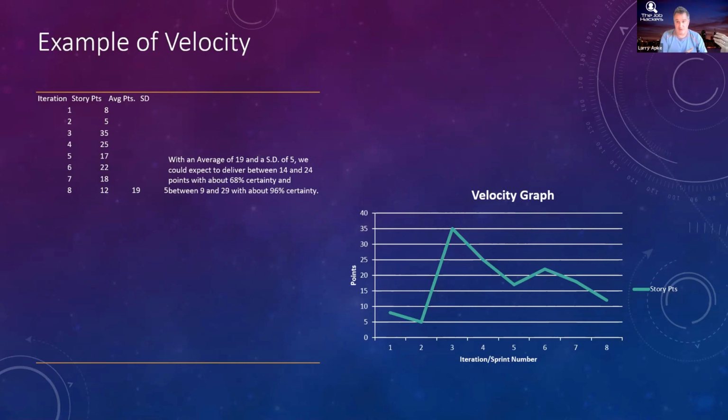This is why project management is a problem for software development and Scrum. Because if I form a team the first month, which is the first 2 sprints, I'm not delivering much of anything. And then if I split them up every 3 months, I've got a 4-month penalty during the year. Don't split up teams, keep teams together and bring work to their backlog.